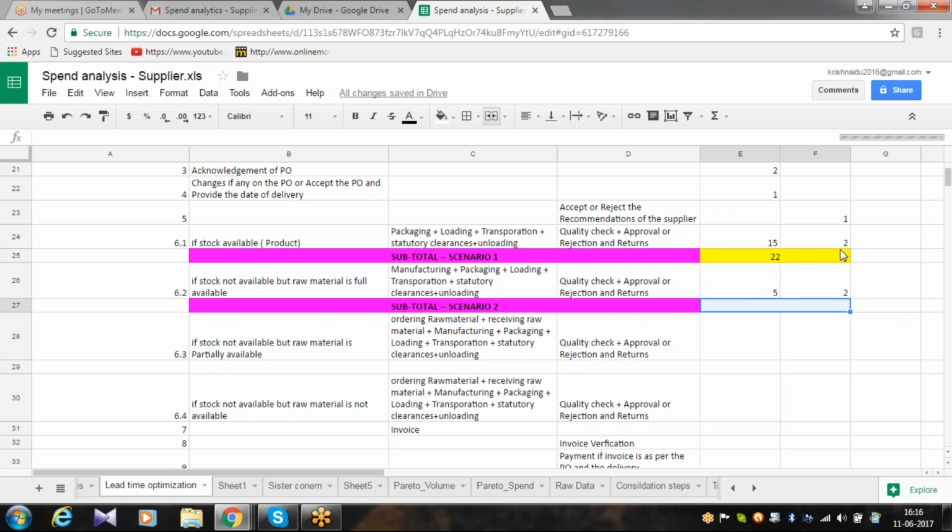2 days is already there, right? You already took 2 days before also. That will remain the same. So here it will be 27. The reason for putting 27 instead of 29 is very simple, because we already have taken these 2 days of lead time for quality check and approval over here already.